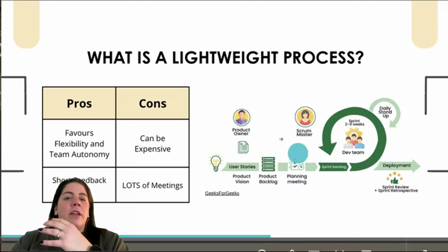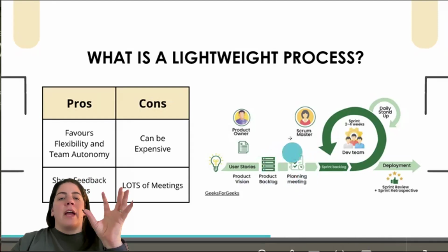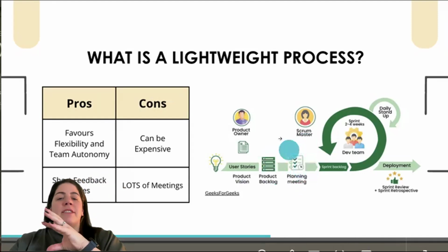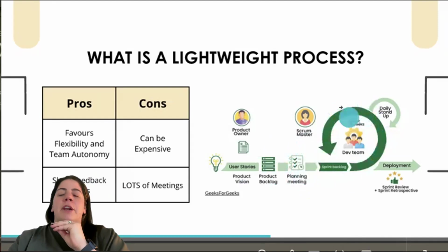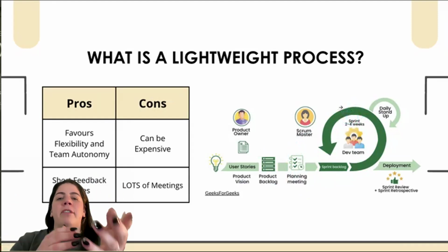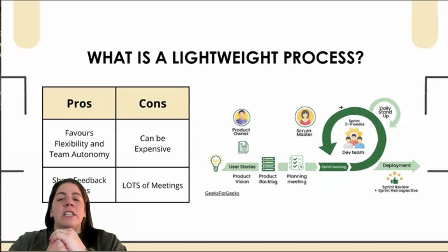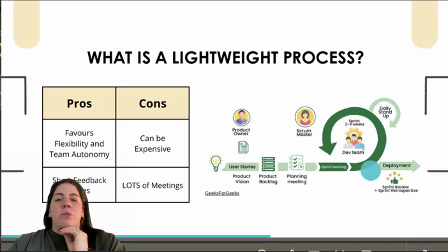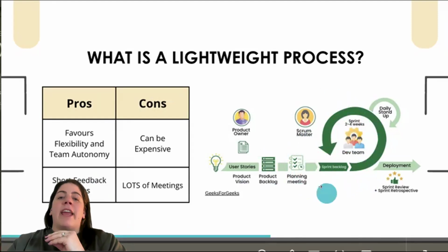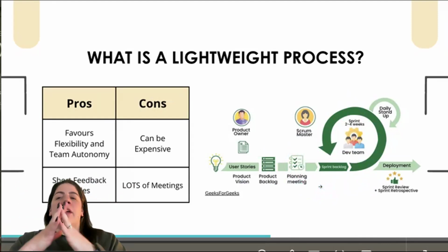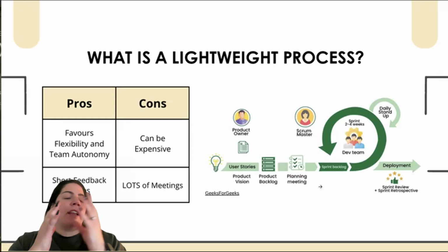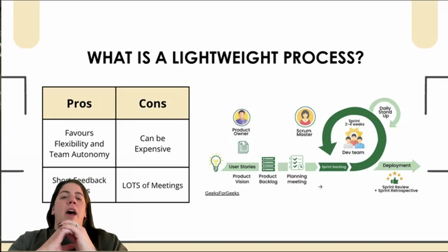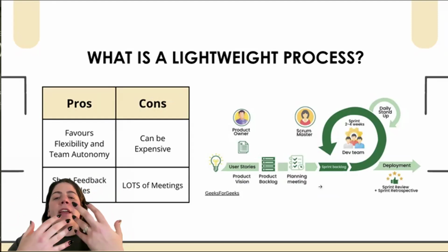And so we can take all of the things we know our client wants, we can figure out how we're going to prioritize and plan them, we can implement them and get them done in what's called a sprint or an iteration. These typically are anywhere from, this says 2 to 4 weeks, but 1 to 4 weeks is perfectly reasonable. And every 1 to 4 weeks, we meet again and we show what we have finished. We often have demos. We can talk about what's changed, what's different, any obstacles we came up against, and go back and start planning again and making different changes.